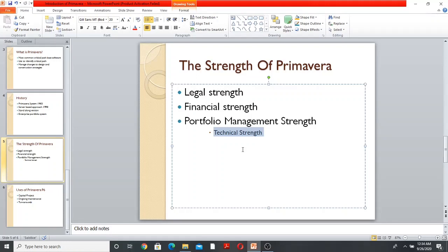Activities can be scheduled according to resources, and complex shift calendars can be included in project plans. Primavera P6 is a pure calculation engine and requires the activities to be sequentially linked. The only other alternative is to mandate the activity start or finish.